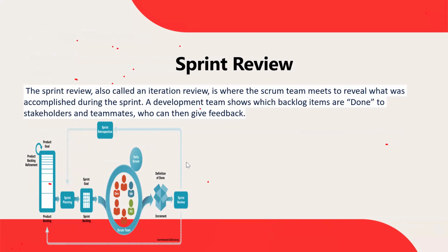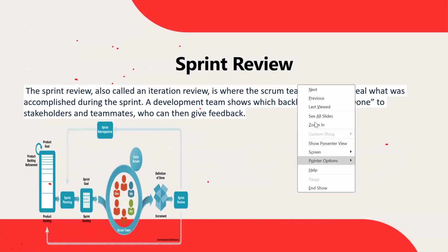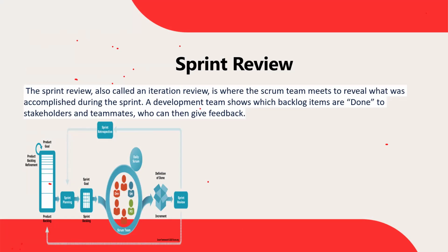So here you can see sprint review will come into the picture here. Just as we have a sprint planning call at the start of the sprint, in the same way we have a sprint review call at the end of the sprint. Generally what we do here is there will be a demo, and then the product owner will give their feedback. If everything is as expected, all these tasks will be moved to the incremental backlog.